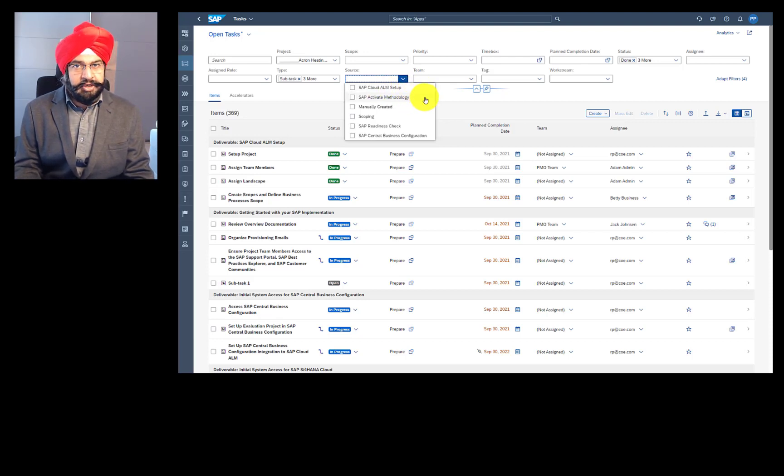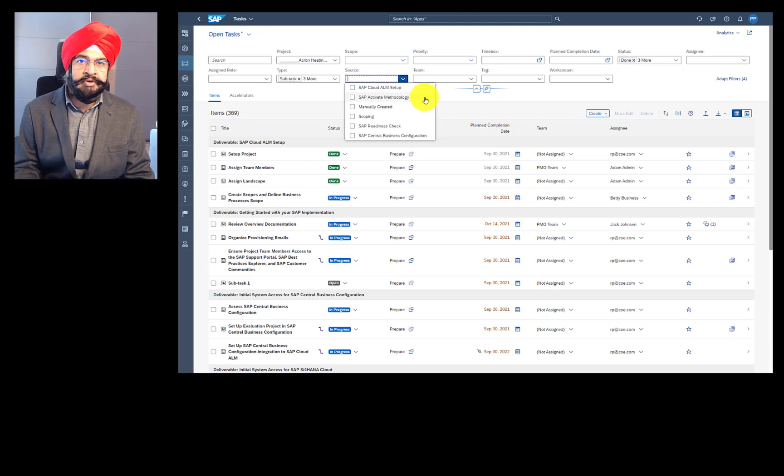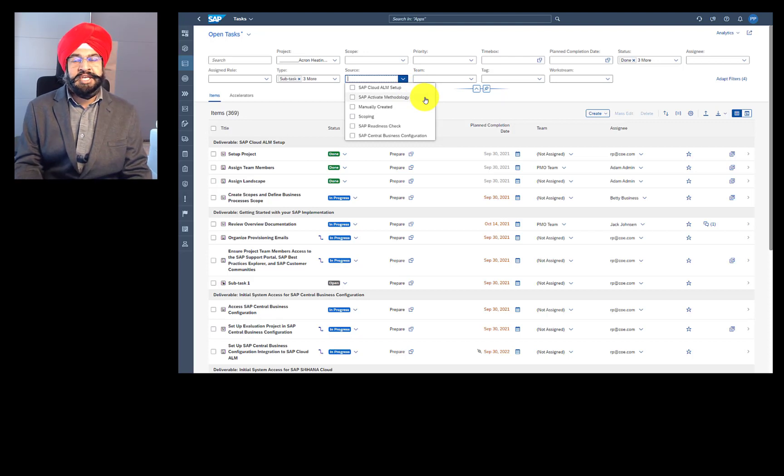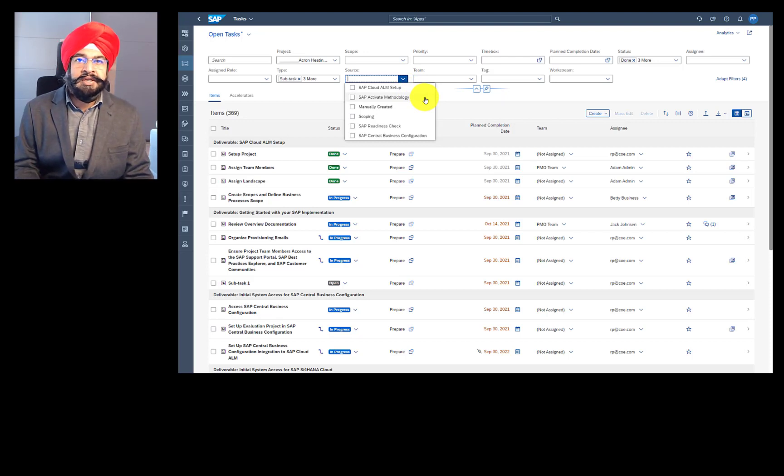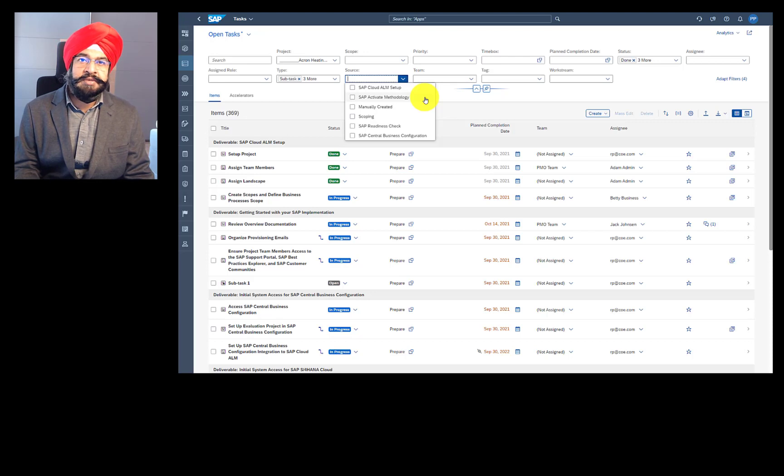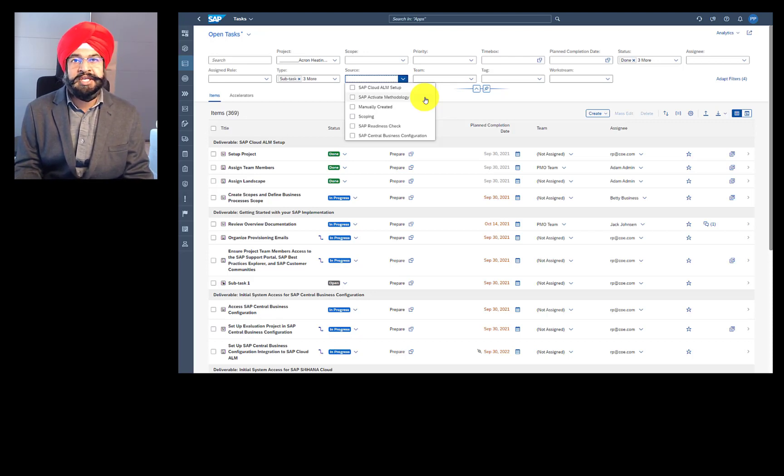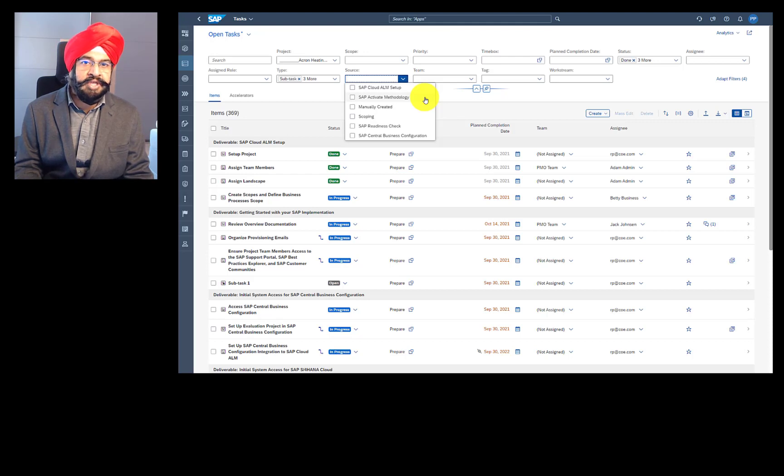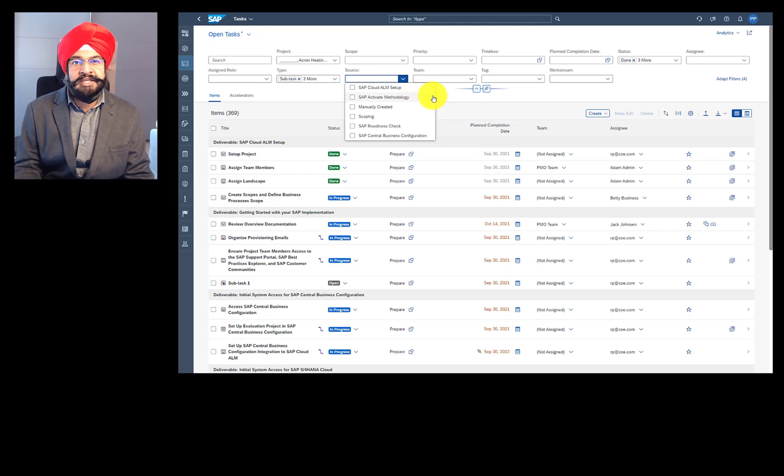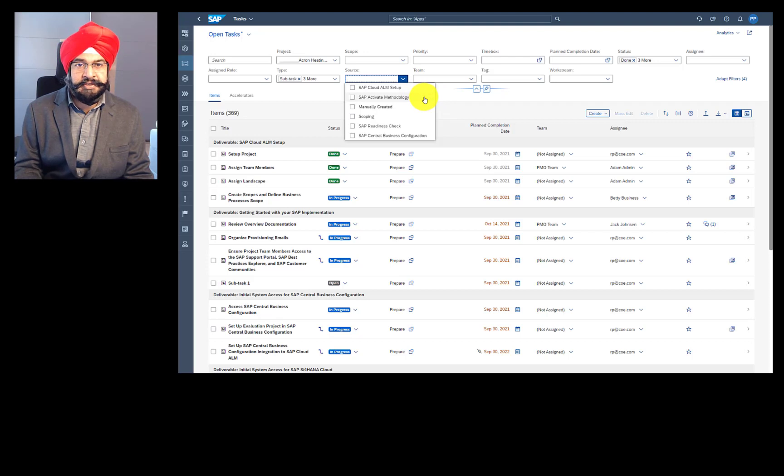But majority of the tasks are provided by SAP Activate methodology. And it has been proven that the project risk is significantly reduced when you select an SAP Activate template at the time of project creation. And you can easily identify all those tasks by using this source filter.